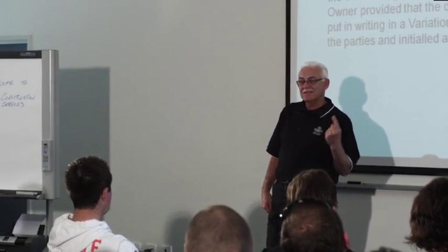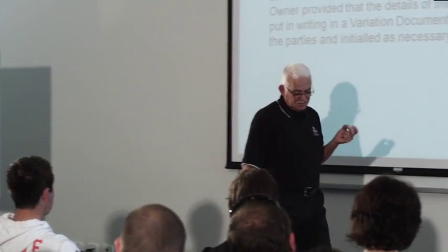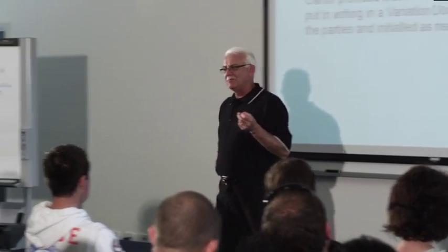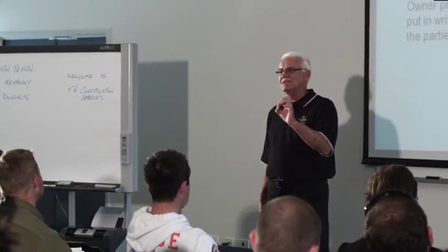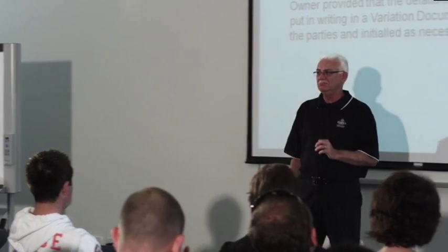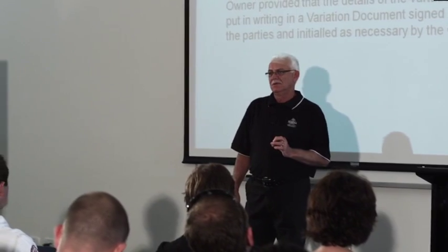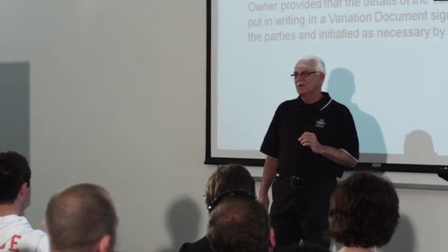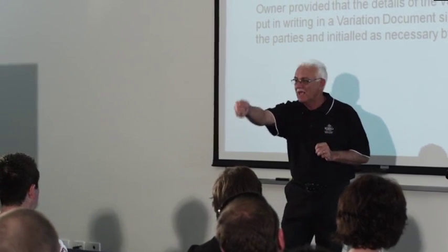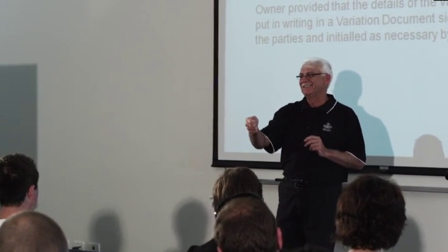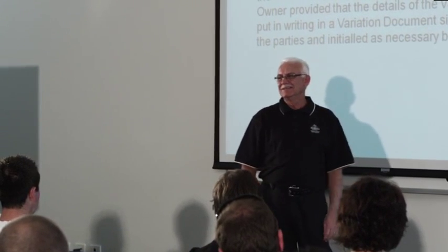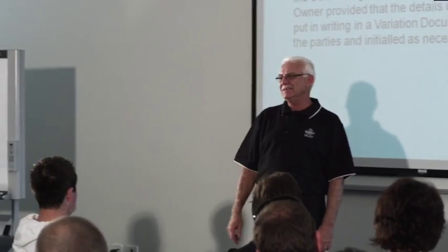What's going to happen, and some of you guys might be doing this already, is you're going to get to the end of the job and you're going to sit down and add up all these tiny little bits and pieces of things that these people have asked you to do, which you've done, and what have you got out of it? A couple of slabs. Well, that's not really enough, so I'm going to hit them with a variation for all the work that I've done for them. At the very end, guess what they're going to do? They're going to just laugh at you and say, you didn't tell me you're going to charge me for this. It's too late now, sorry.